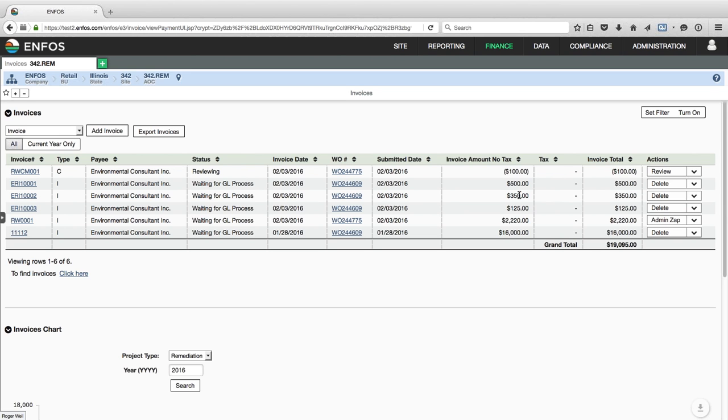I'm not sure if we'll answer this correctly, but to reduce a work order amount, we do have the re-estimate functionality that lets you lower the amount of an already approved work order. And you can do that on the T&M tasks, or on the fixed price tasks, or the units. You cannot lower it to a value that's less than what you've already billed, right? So if I had a $10,000 work order and I already billed $8,000, if I try to re-estimate it, I'm not going to be able to lower it to the 8 because I've already spent the 8.